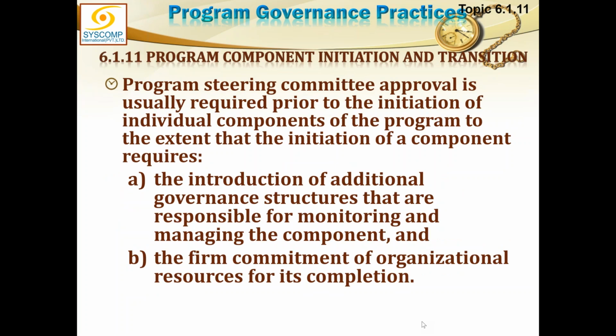Program component initiation and transition. Program Steering Committee approval is usually required prior to the initiation of individual components of the program, to the extent that initiation of a component requires the introduction of additional governance structures that are responsible for monitoring and managing the component. Now, this is a very heavy statement, number one.